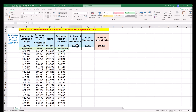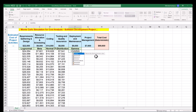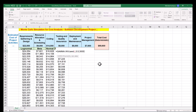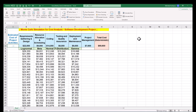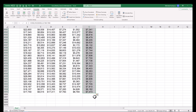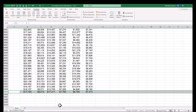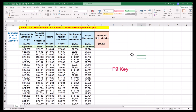The fifth project activity of development and maintenance has a single point estimated cost of $9,000. The best fitting distribution is gamma. Enter the gamma inverse function in the formula bar, then click and drag down to generate 5000 random samples. The sixth activity, project management, has a single point estimated cost of $7,600, and chi-squared distribution explains the data scatteredness. Use the chi-squared inverse function and drag down for 5000 non-deterministic cost scenarios. This dynamic worksheet can be refreshed using the F9 key. This concludes step one.